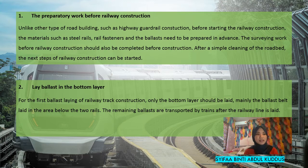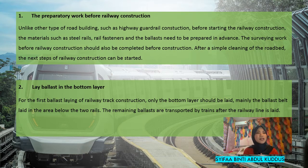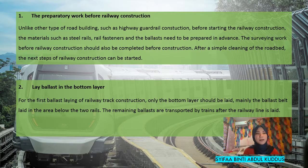The second step is to lay ballast in the bottom layer. For the first ballast laying of railway track construction, only the bottom layer should be laid — mainly the ballast belt in the area below the two rails. The remaining ballast is transported by trains after the railway line is laid.